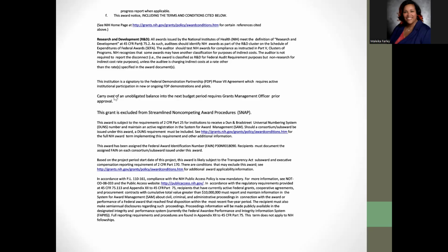And then one thing that I feel like I need to always tell my PIs is if you get carryover approval and then you don't spend the carryover in the year it was awarded in, it gets restricted again, and then you'll have to request it again. And then also talking about the expired funds.